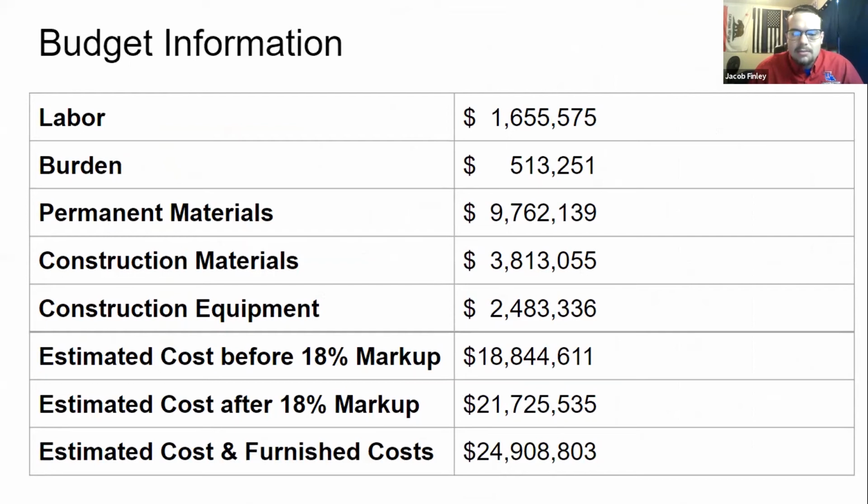The 18% markup was to account for the float in the schedule, any hurricanes, any damages that may happen, as well as we would be working in 3 different calendar years, and we wanted to make sure if it was set up on a pay interval that we were making sure that our guys were getting paid and we weren't taking out big loans or anything such as those.